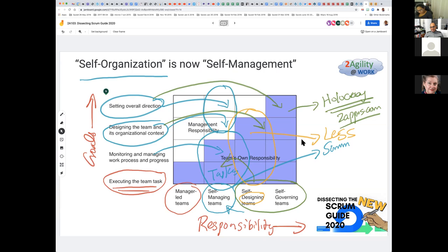Now, granted, you want to try to say something like, and other duties as assigned, which I always hate when it's in anything I have to sign up for. But that's the only way you can guarantee that you have someone who will pitch in. And the other thing is, a lot of times you need enough different skill sets that no one person can have them. And you really do have to have people matrixed. Maybe if you've got a team of multiple teams that are working together, maybe you have them matrixed to one team 20%, another team 30% in their specialty, because all the teams need a partial resource.